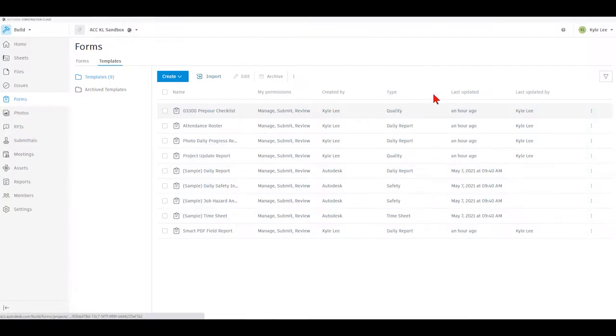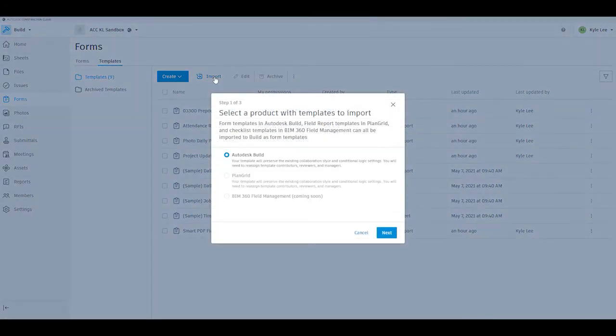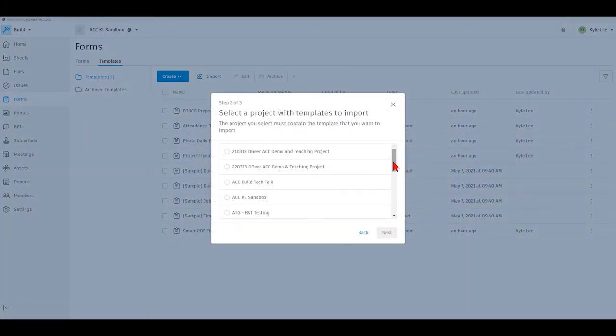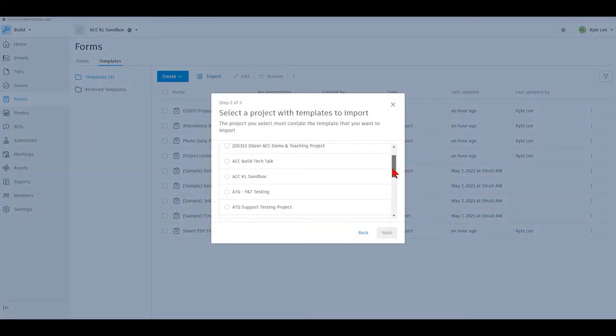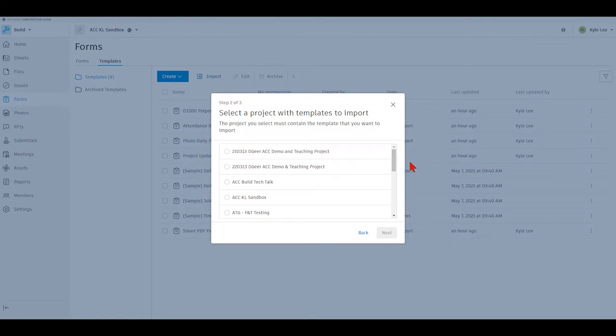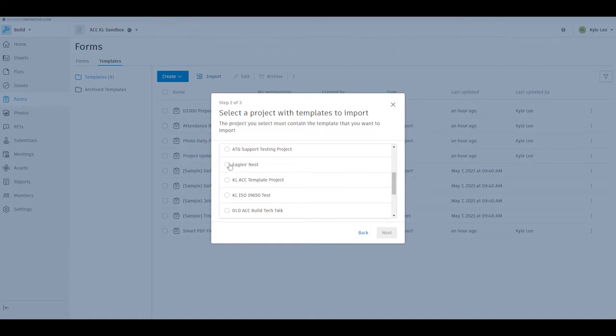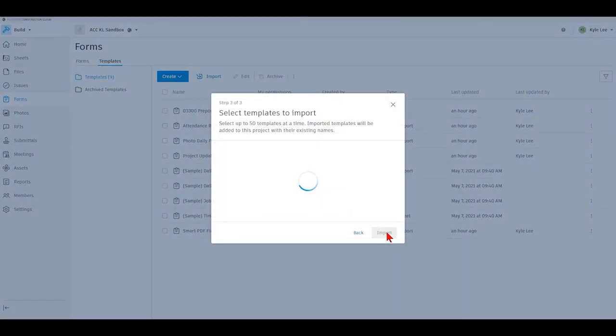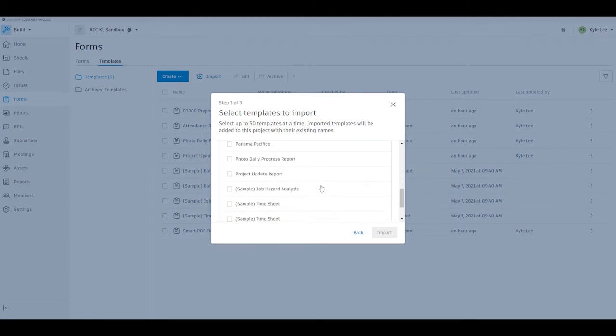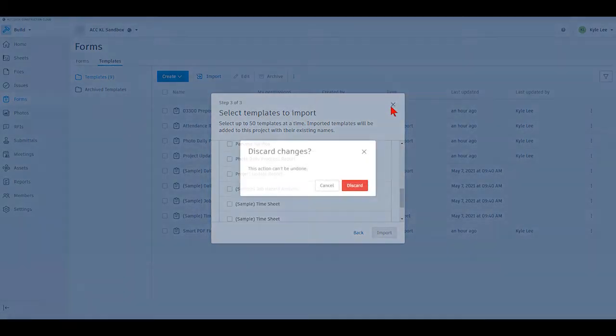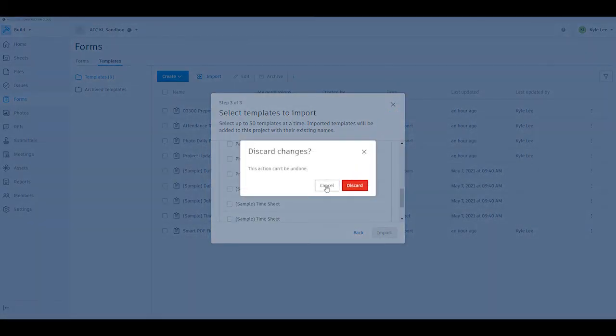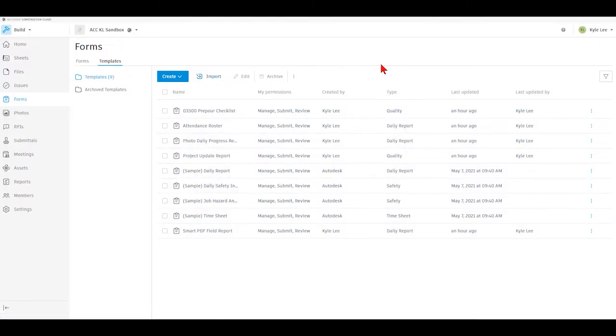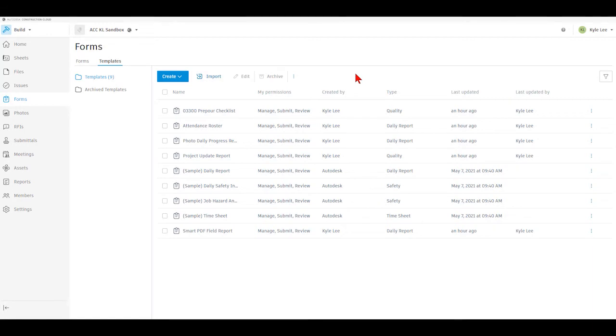The other way that we can import form templates into our project is with our import button here. Right here it tells us that we can look at other Autodesk Build projects and bring over form templates from those projects that we've been invited into. We would just say next and then we would potentially select the project that we would like to bring the form templates in from and then select the individual form templates. So again, there were three different ways that we could essentially import our templates: build a new template, upload a smart PDF using the create button, or use the import to bring in a template from another build project that you have access to.